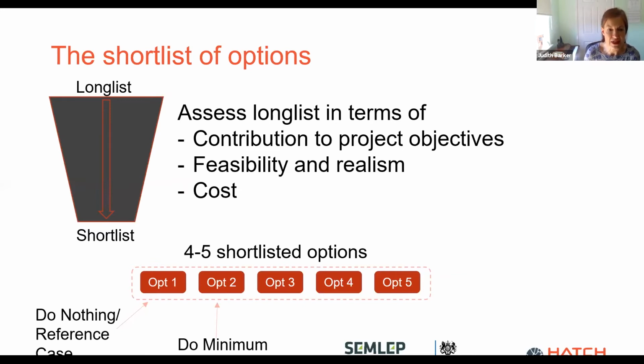And what you do need to consider is what would happen if you did nothing, and what would happen if you did the minimum. And that really demonstrates what you get if you add the project on top of the doing nothing. You really get a sense of the extent to which this proposal that you're developing really adds value and really brings the outputs to get, really delivers on the problem that you've set out. So that is really worth spending a little bit of time on, and both of the application forms do include that options analysis, and it is persuasive when it's done well.